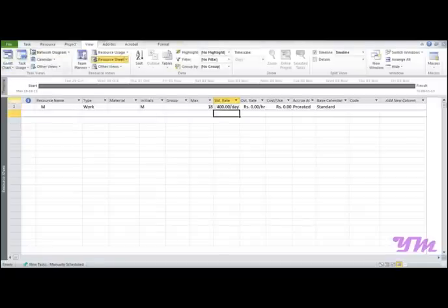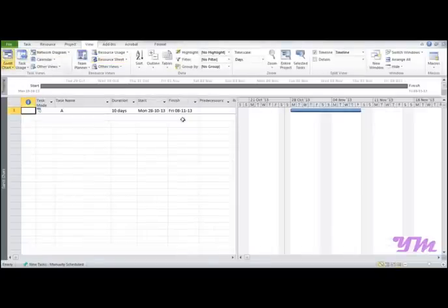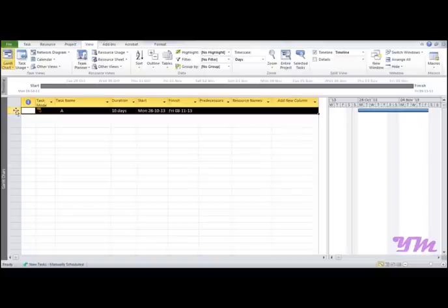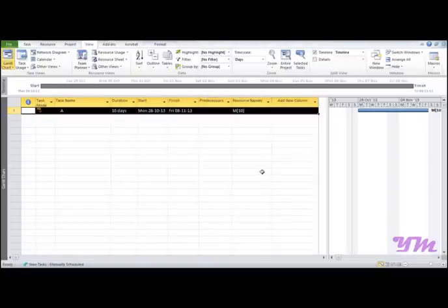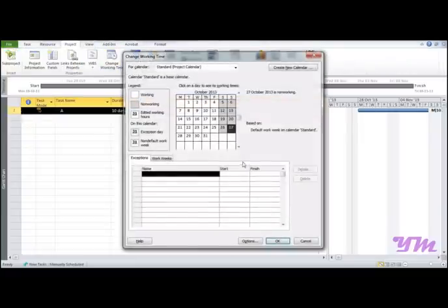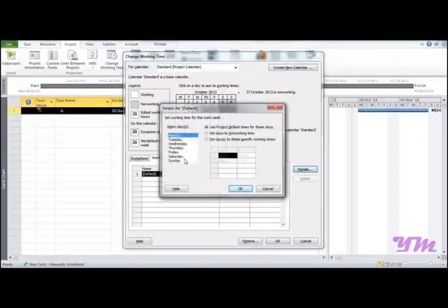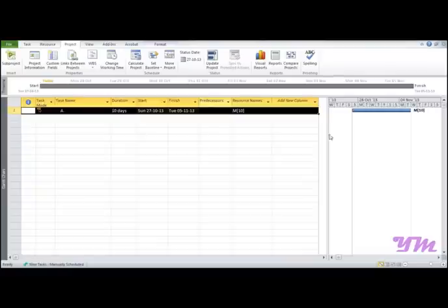And then we will go to the Gantt chart view, double click over here and add the resource, that is M having units 10, and click on OK. And to simplify the work, we will make the working time all 7 days a week. So go on to work weeks, details, select all of the days as you all know, set specific time and click on OK. So all 7 days of the week are now working and we have a project which lasts for 10 days. Then we need to click over here in the Project menu, that is Set Baseline, and Set Baseline.